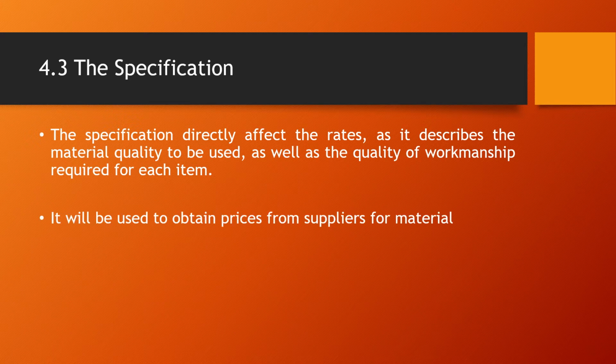And you also use the specification to get prices from your supplier, because the specification, as I just explained above, gives you the details of the material. So normally when you're sending out a quotation to the supplier, you don't just send him the bill of quantities, but you would want to send the specification as well.